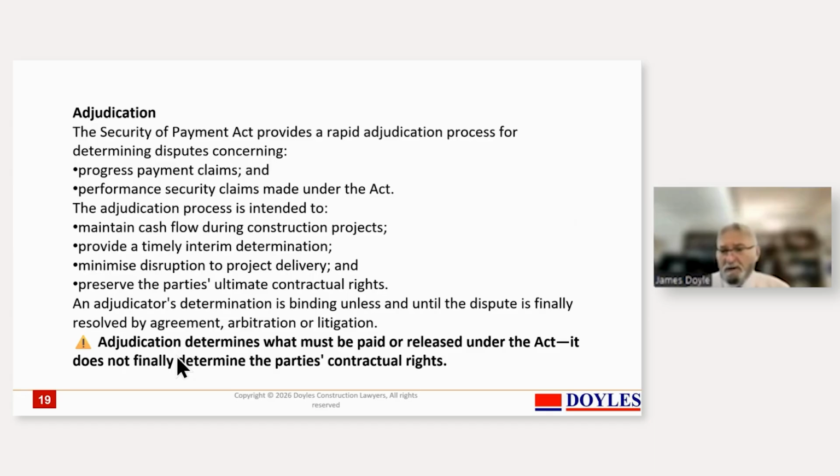The situation is you don't always agree with them, but on the other hand, it's clarity, it's certainty to get a decision whereby you can say, well, at least someone independent has looked at this and come to this view, and that's a little bit better than having to talk to the other side who's intransigent and not going anywhere. So broadly, it's meant to be a rapid adjudication process. It's usually pretty quick, and usually 10 days will see much of the work done and finished. An adjudicator will then thump out his decision, and provided you pay his fee, you get to look at it. So it's reasonably straightforward and reasonably effective. And for the claimant, it's much better than going to court.